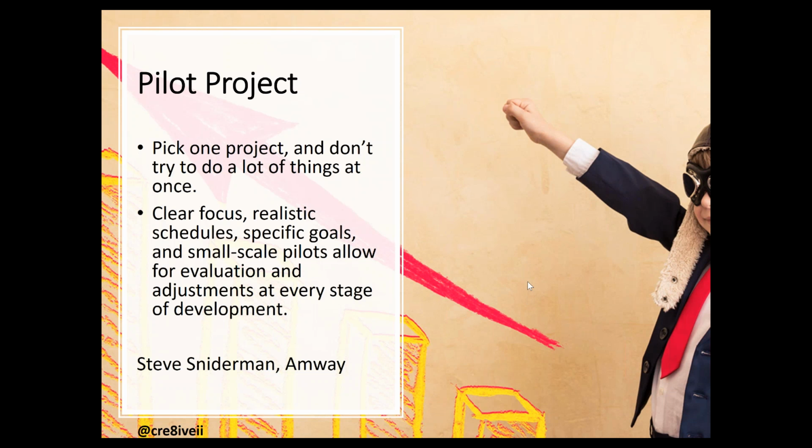And then remember back to the project that I talked about with the real estate company. When we developed our first project, we chose not to implement everything that we could do with mobile learning, the responsive design, the things that really take advantage of moving to mobile technology, because it was our first project. And we wanted to have a small-scale project that allowed us to evaluate and make adjustments. And I think that's very, very important.